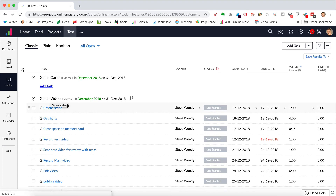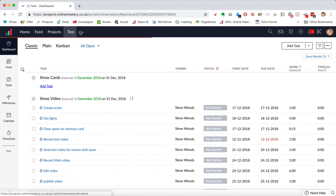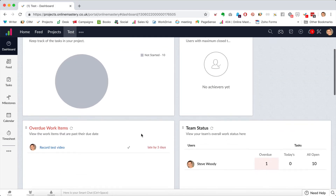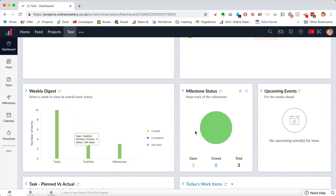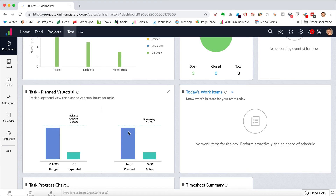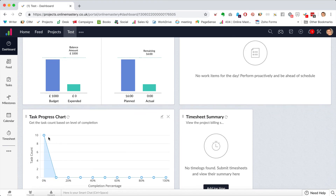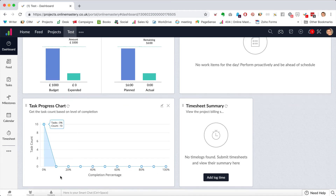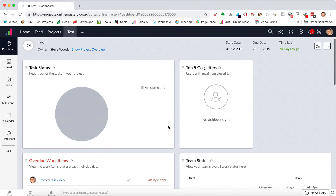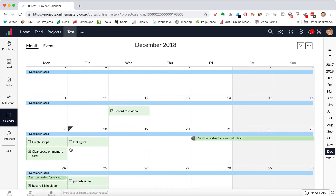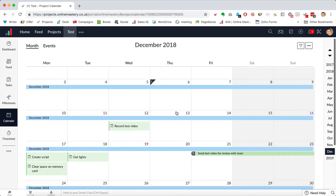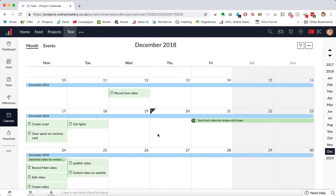Coming back to the dashboard, I can see I have 10 tasks, I can see what's overdue, what's due, and — really importantly — what's planned: 16 hours of time have been planned out so far, and all tasks are at 0% completion. So I know I need to allocate 16 hours in my diary. I can also click on the calendar to see when everything's due and block out that time.